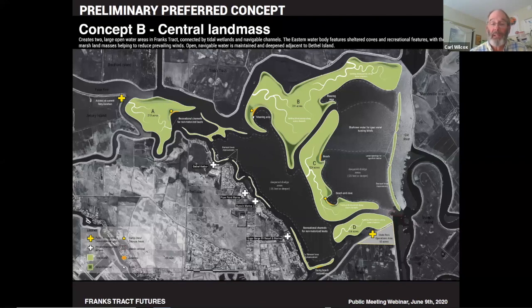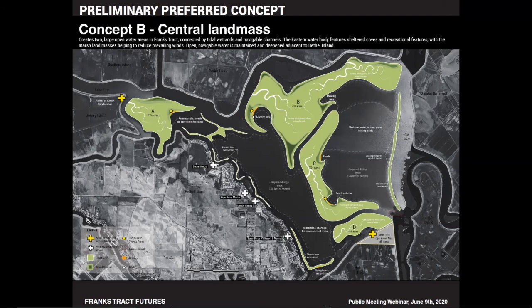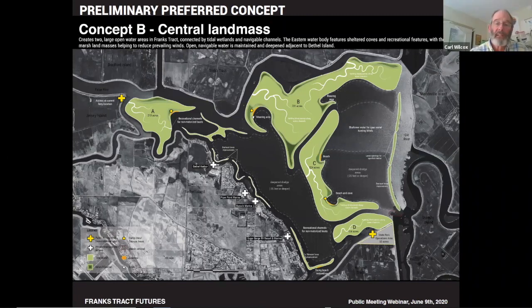So assuming we finish this and then there was an interest to proceed further, you're probably looking at 3 to 5 years to actually get a project designed, approved, and implemented, and all that's contingent upon there being a willingness to fund such activity.